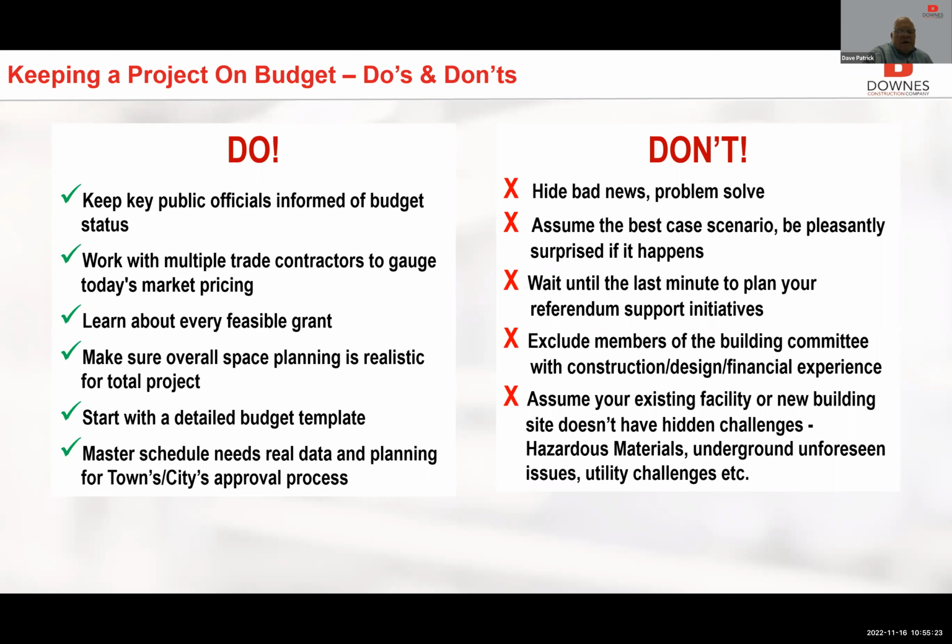We always encourage people to work with multiple trade contractors to gauge what's going on in today's market. When I tell you that our pricing models change almost weekly, I'm not embellishing on that. They are changing constantly. One of the things that our pre-construction group does is meet with some of the larger trade contractors every couple of weeks in a little touch base meeting to find out if anything has changed since our last meeting. So rely on the trade contractors to help with the most up-to-date information.